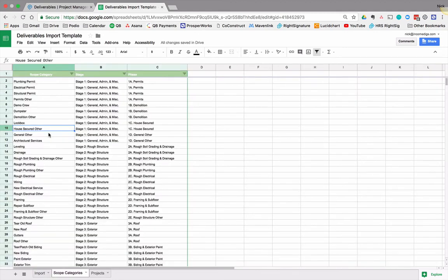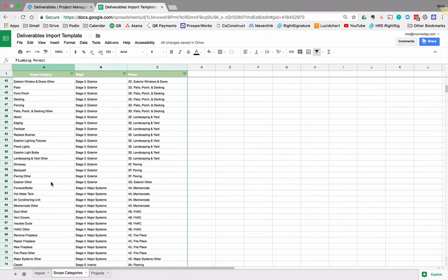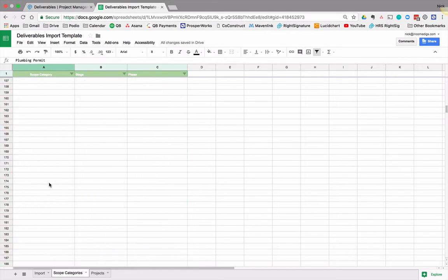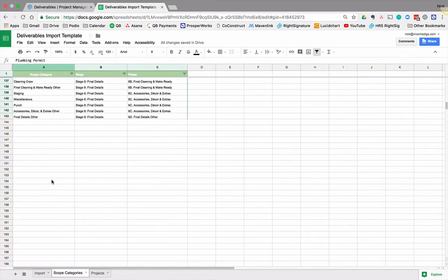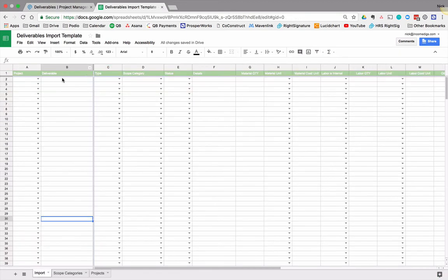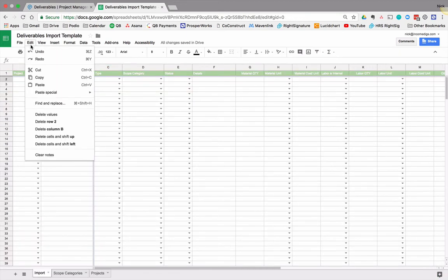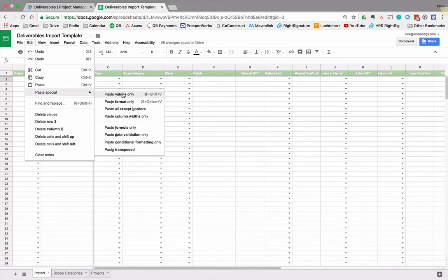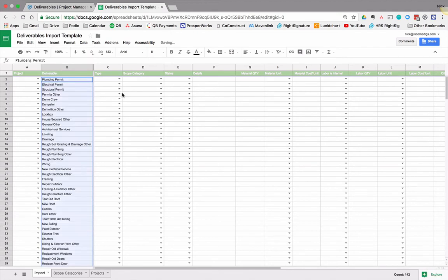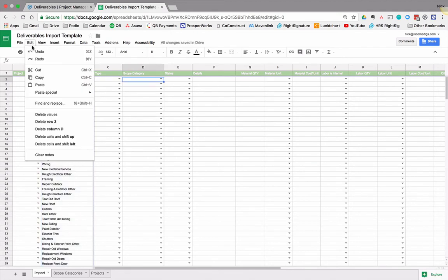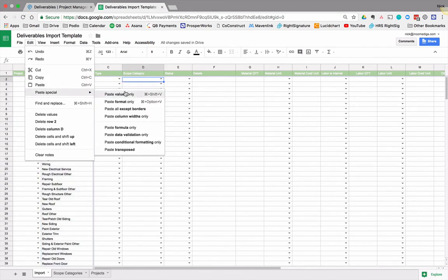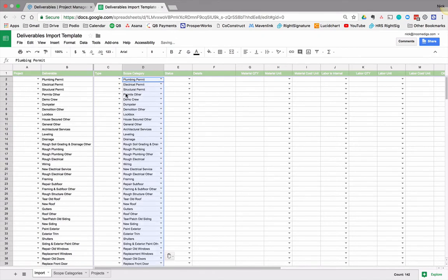Use your scope categories. So let's go to our scope categories. Let's click and let's select all of these. So 142 of them, I think. Then go to the import and then for the deliverable, just go ahead and edit, paste special values. Now the scope category of course is going to be the same exact thing. So this is kind of assuming that we're going to have to do all this stuff on this project.